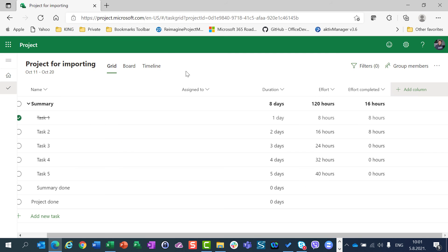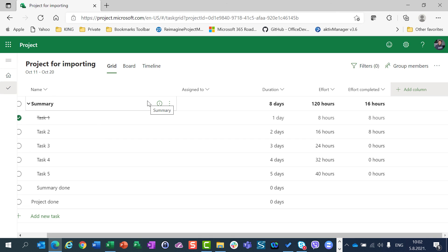So you can ask yourself, what is the value? Well, it's up to you. If you think that a lot of things are not going to be imported and that it's messy to reestablish the project from desktop to Project for the web, you can start typing your project from scratch. But if you find out that a lot of things can be copied and there are not many things that should then be edited — like assigned-to or relationships — then I suggest you copy the project from Project for Desktop to Project for the web.